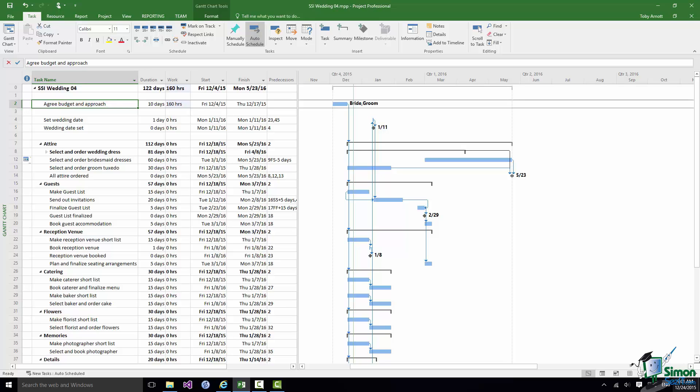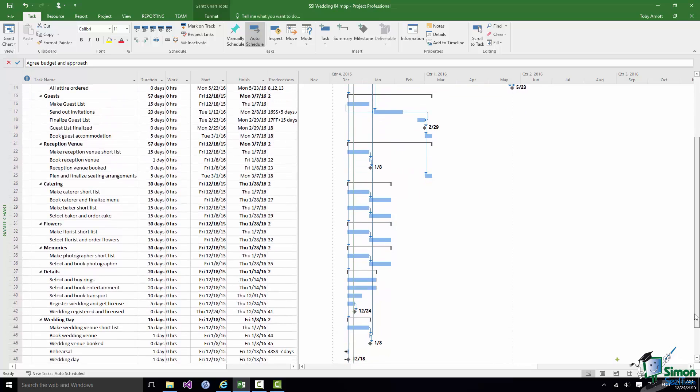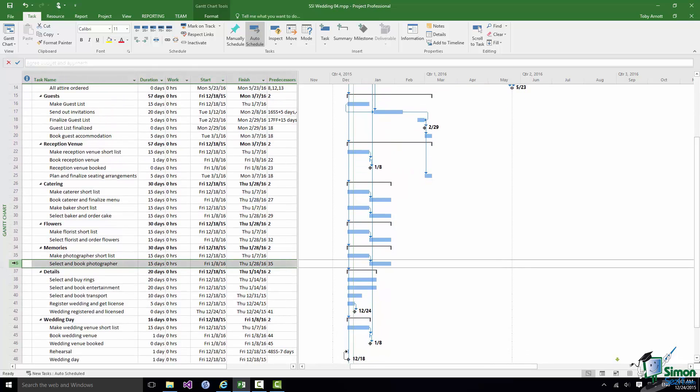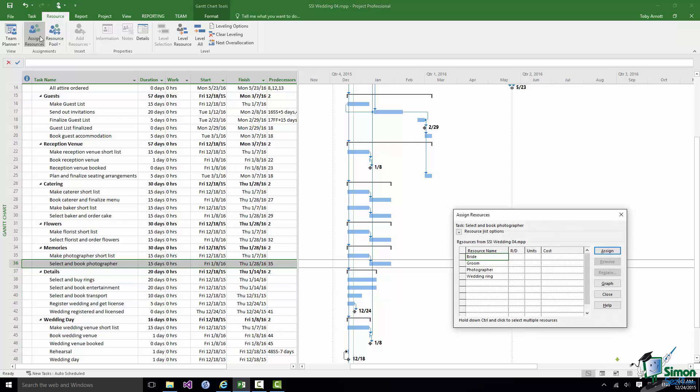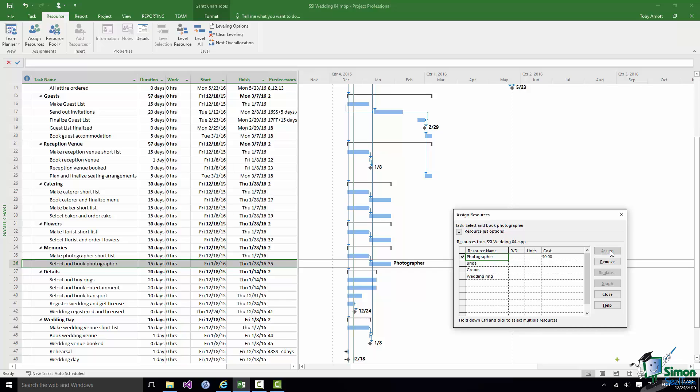Let's go down to the Photography section and let's suppose that I want to assign the photographer to the Select and Book Photographer task. So I'm going to assign the cost of the photographer to this task. On the Resource tab one of the buttons is Assign Resources and that brings up the Assign Resources dialog and from here I can assign the photographer. Now don't forget that when I assign the photographer we don't have a cost assigned because it's a cost resource and we haven't specified what that cost is until we actually assign it to the task. Now we're going to allow for the fact that the photographer, videographer we're going to use is going to charge around about $1,500.